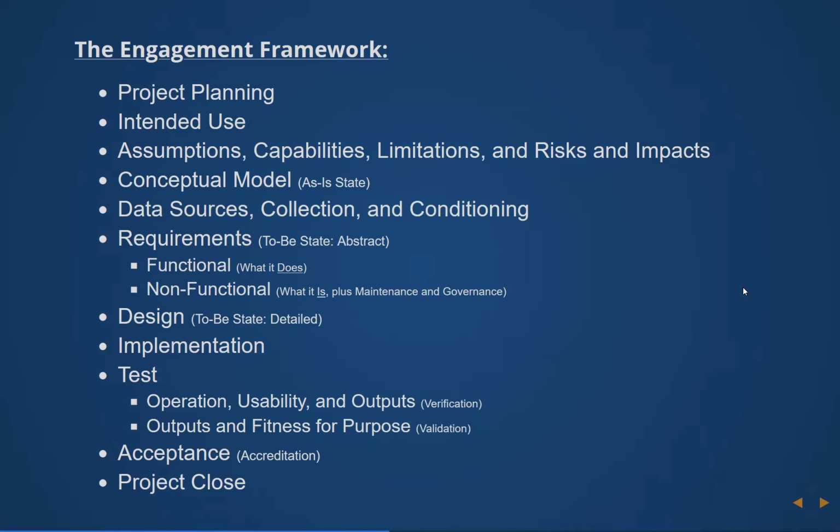Once you do all the testing, you will do acceptance and handover, and that can be full acceptance, partial acceptance, and you'll have to go back and fix more stuff. Partial acceptance, and yeah, good enough, we're not paying for you to make it better.